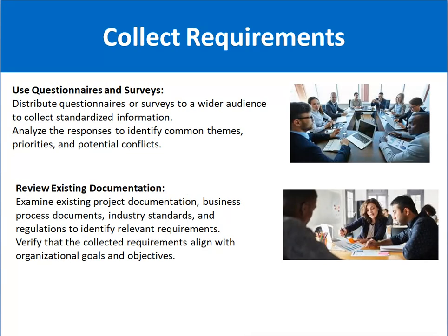You can also use questionnaires and surveys. Make a questionnaire, distribute it to the stakeholders, and get their feedback. Once you get the feedback, analyze their responses to identify common themes, variations, and potential conflicts.